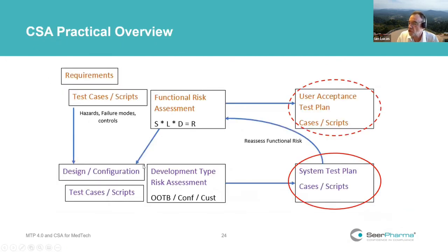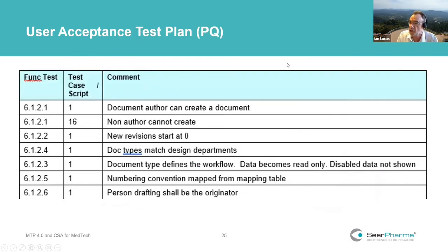Just to sort of finish this off here. So you've gone down here, you've got your test plans, then you actually use this up here to come back and, in a perfect world, you would have your vendor doing a lot of testing, justifying that, to come back here and update your documentation. And then you would come up with a set of user acceptance tests. And again, this is good because it becomes a regression. So the first time you do it, you're going to test everything. In a year's time, you get an upgrade, you make a few changes, you come back to this document, you've only got to pick a subset of the particular tests, but it becomes the self-sourcing testing document.